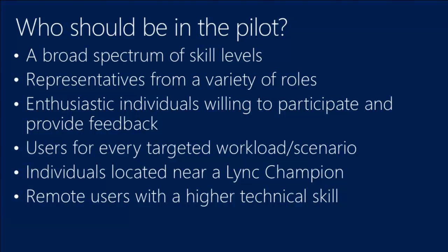You need to identify users from different parts of the company with different skill sets where it makes sense. Users also who collaborate. Link is great, Link conferences, if the user that I need to talk to on a regular basis has also Link. So make sure that if you add a user to your pilot, that the persons that he speaks most to, at least a few of them have also Link.